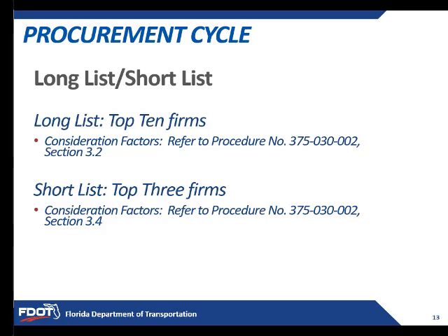Considerations for shortlisting: past performance, the volume of work previously awarded to the consultant, including supplemental agreements within the past 5 years, the distribution of work among competing consultants, and the utilization of the new consultants. So what we want to encourage is economic competitiveness.